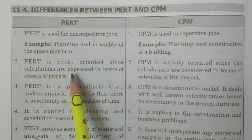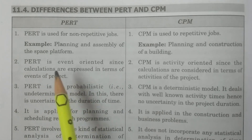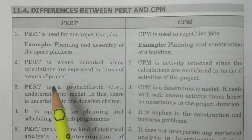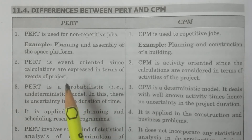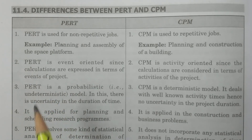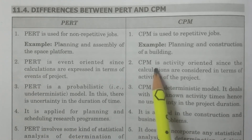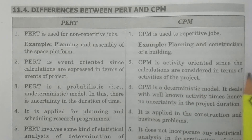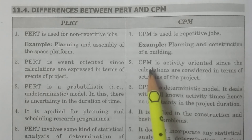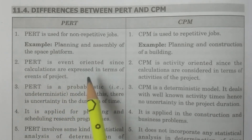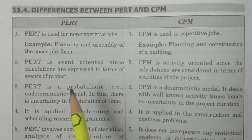Coming to the second point: PERT is event-oriented, since calculations are expressed in terms of events. Events are nodes — if you join two events, you will get an activity. Activity is formed by joining two particular events. CPM is activity-oriented, since calculations are considered in terms of the activities of the project. Critical path method is activity-oriented programming, and PERT is event-oriented programming.